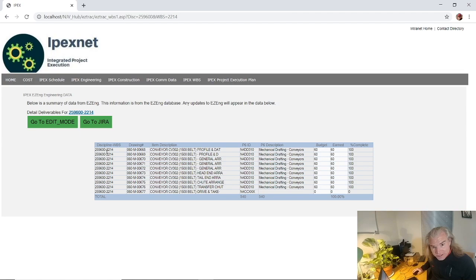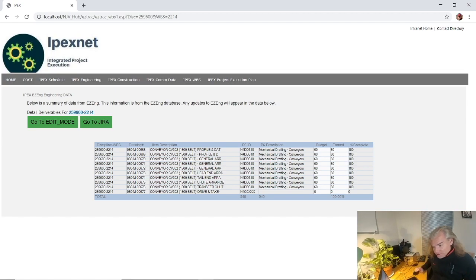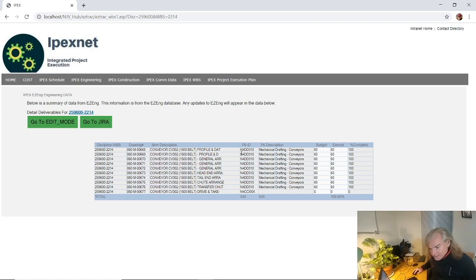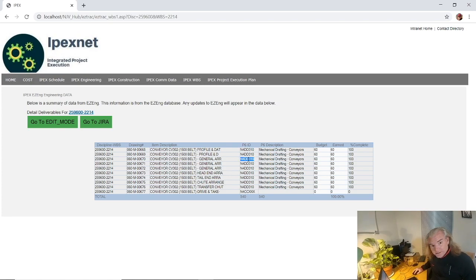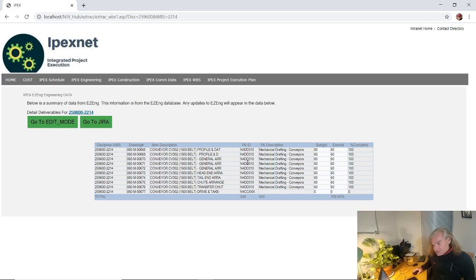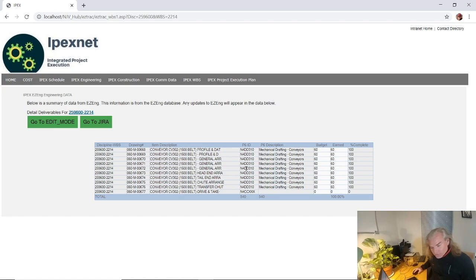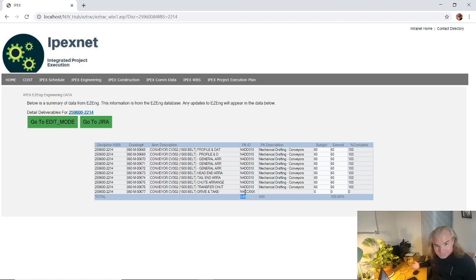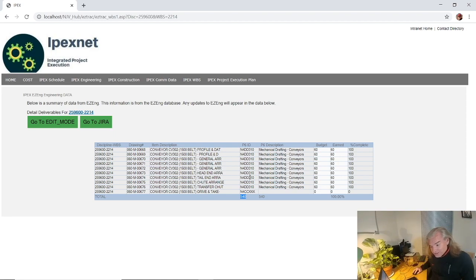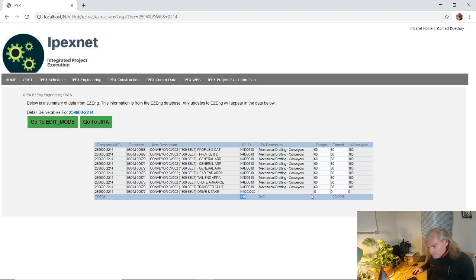Now, one element of integration that's very similar to our construction verification is on our elements we're putting schedule IDs onto our elements. This allows us to consolidate the sum. In our schedule we'd actually know that we've got 540 budget labor units for that particular ID, and we get the percent complete from that ID from systems such as this consolidate by schedule ID.